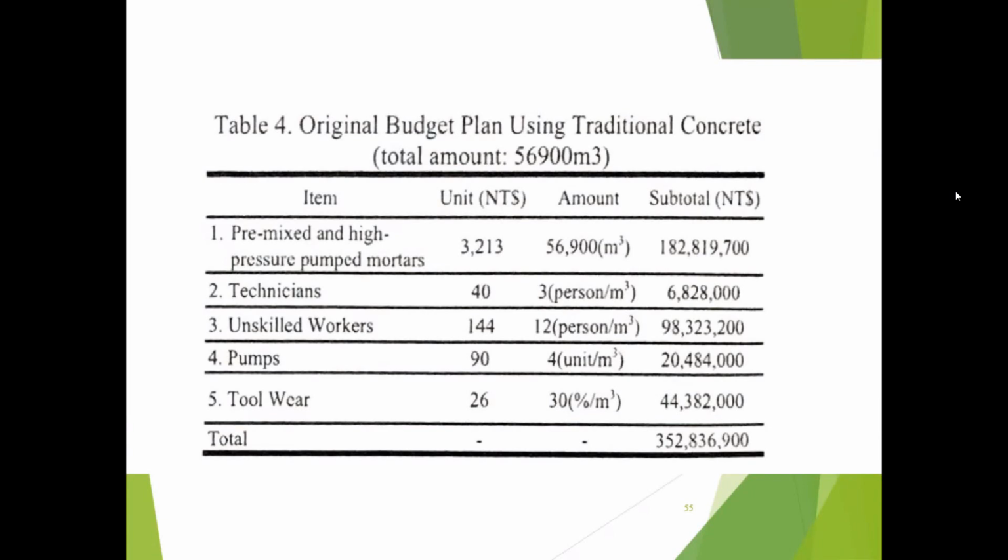Is that clear? So in each phase, what has happened? Functional phase, very detailed functional analysis. The outcome is to remove whatever functions are not essential, secondary, and also not required for the performance of the essential function.